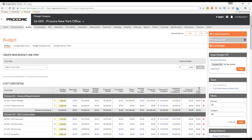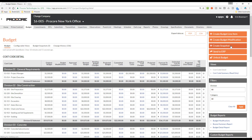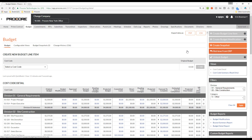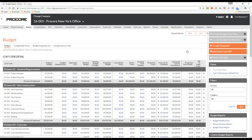Now that the budget is in Procore, we can send it to QuickBooks. To do this, the first thing we need to do is click Send to ERP. But notice that it is grayed out — this button is only available if the budget has been locked. Now that the budget is locked, the Send to ERP button is available. Anything that is going to be exported to your accounting system must first be approved by someone at your organization who has been designated as an accounting approver.